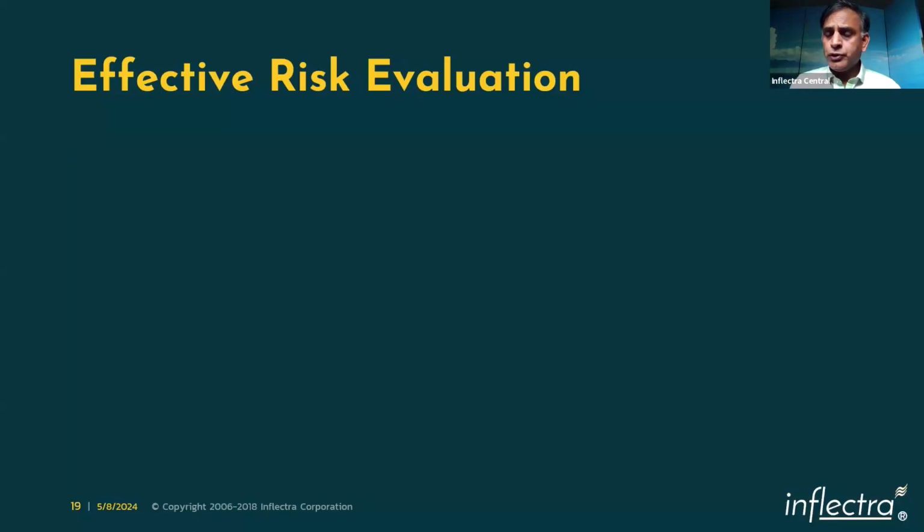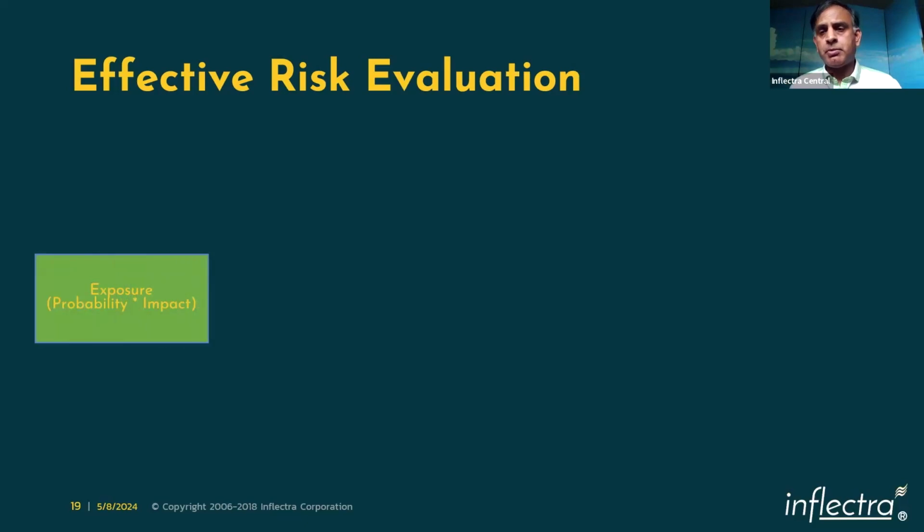Now, once you have done all these analyses, how do you move forward? This is when the decision making comes into play, right? In order for you to factor in the decision making in the normal conditions, what we have is the probability and impact gives you what is called an exposure. What is my risk exposure, or risk score, in other words? So based upon that, I can come back and say the highest risk score is what is going to be worked on, which is good.